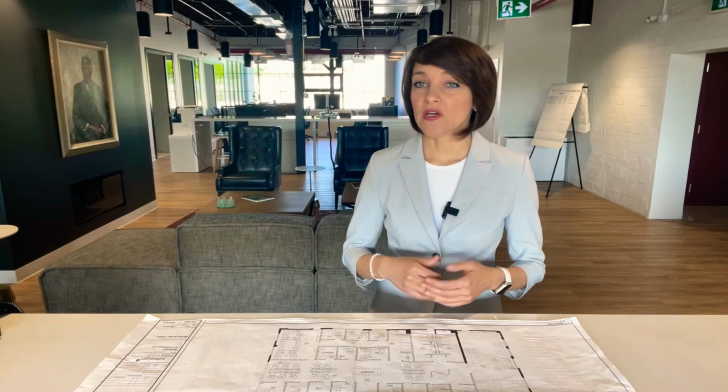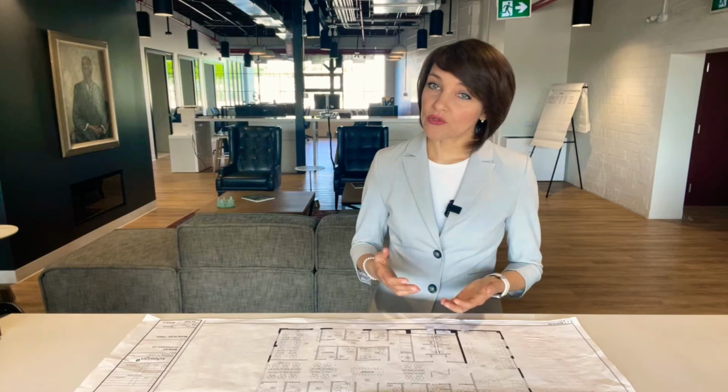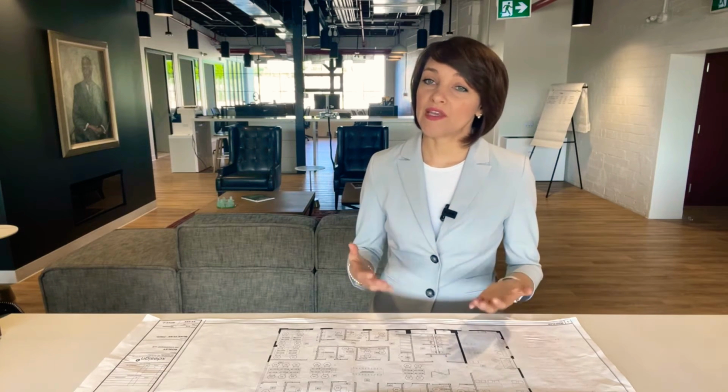Now let's talk about what the typical price per square foot right now in Toronto is. It is a complex question because we need to understand the location of the house, size of the house, and its style. But you as a consumer really need to understand the range. So what you do is you take an existing home as a benchmark in a certain neighborhood and ask your prospective builder or general contractor how much per square foot it will be to build this type of a home of this square footage in this area. They should be able to give you a number per square foot.